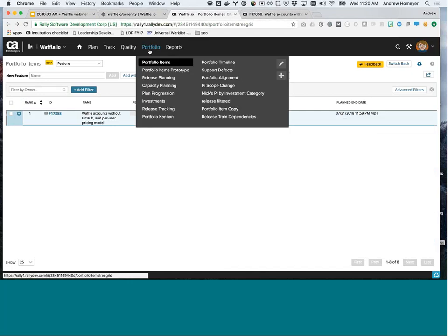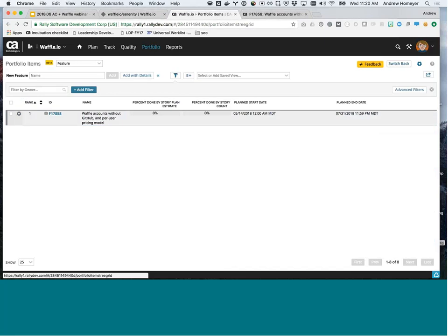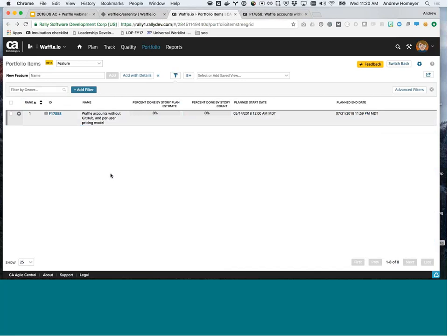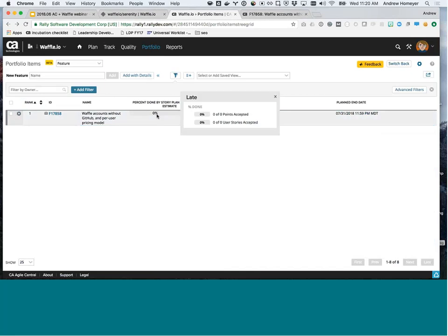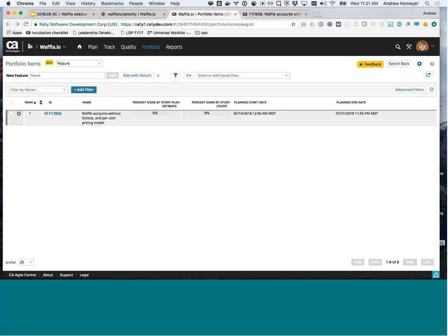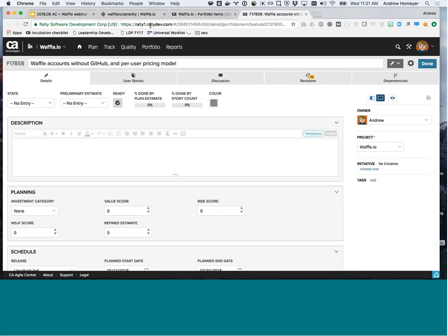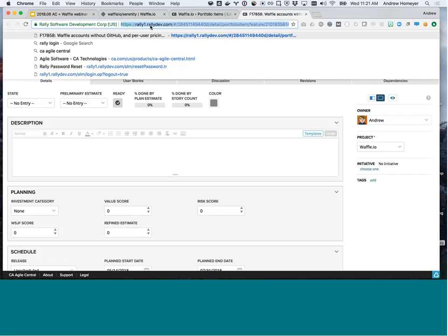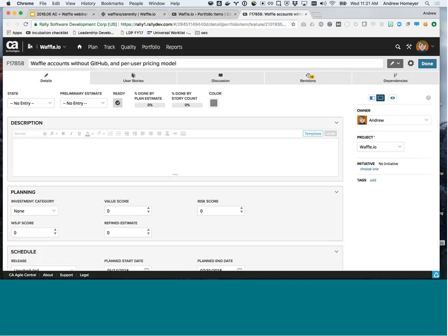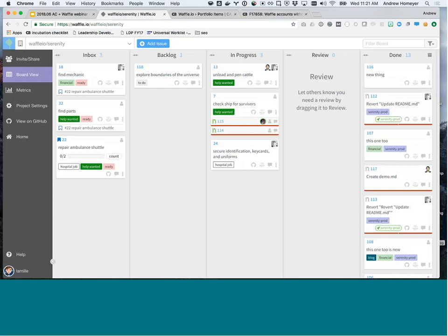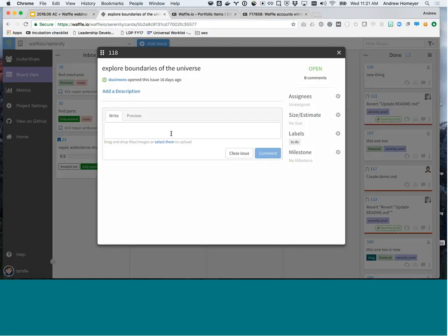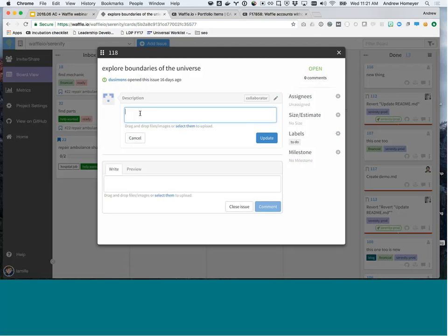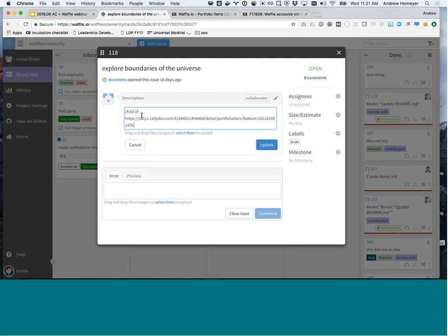So portfolio, then portfolio items. I'm looking at one right here. So 17858. So like I mentioned, Waffle connects cards up to the portfolio layer. So right now we see that we are at a 0% done. So 0, 0 points and 0, 0 user stories. So remember that for a second. Jump to the details and just copy the link to that feature. So this is how we connect things together. Just copy the link, jump back to Waffle, and then inside any card, this could be within an epic inside Waffle or a pull request or an issue. It doesn't matter. And just say that it's a child of that link to that feature.